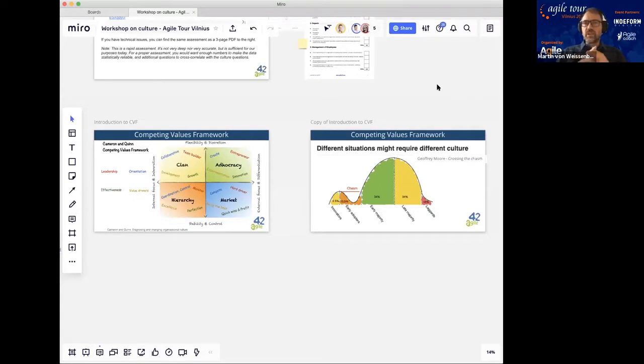Now we have support teams. There's like IT. There might be finance, legal, HR. There might be others who are kind of providing services to other teams. But if you are providing components, then I would be very, very careful. Let's say inside an IT department, and one team is building the database, and then another team is building other stuff on top. Then you have dependencies, and the database guys are just one more step removed from the actual live mythical customer that they have never seen.